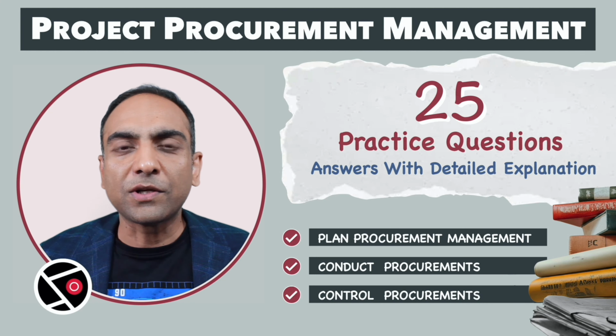Let me give you an example. Due to a bug in the code from the supplier, a car maker had to recall 1 million cars. The cost is more than $100 million. The car maker can potentially ask the supplier to bear this cost of $100 million. To avoid such a situation, the seller negotiates the limited liability clause, limiting the maximum liability of the seller to a certain number, let's say $1 million. With such a clause, supplier risk is only $1 million, while the buyer bears the remaining $99 million risks.